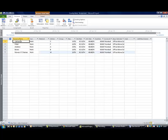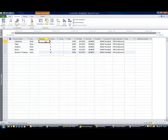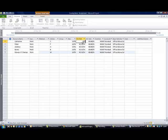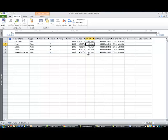Catherine is a resource of type Work. She's a resource that works on the project. You can ignore the Material column for a work resource, so you don't put anything in there. You can ignore the Group column. But the next thing that matters is her cost per hour and her overtime rate. So she costs us 100 euro per hour, and she's on double time there on 200 euro per hour for overtime.